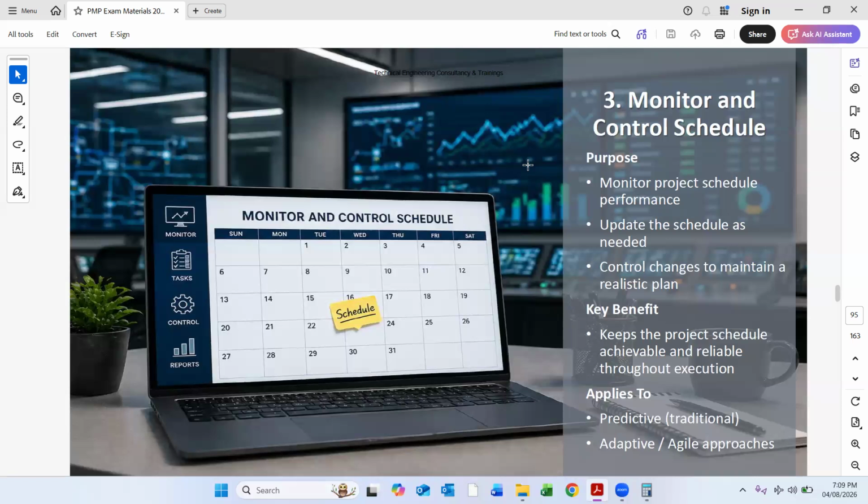So this is how we monitor and control the project, and we have milestones. We have discussions on the schedule and variances in the progress meetings, and it is properly reported to the client and consultant on a weekly and monthly basis. So this is how we monitor and control the schedule. If there are some changes, we go through the approved change control process in the project. And also, if we are finishing some milestones, we are also completing our deliverables to the project.